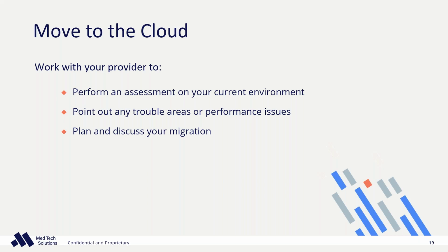speak with that provider and ask them to perform an assessment of your current environment. Have them review everything that you want to move to the cloud. And again, there might be things that you want to keep on premise, and there might be stuff that you want in the cloud. So be clear and define what your migration to the cloud actually looks like. And if it's everything, it's everything. It really just depends, so that's up to your team and your decision to make. But have them perform an assessment.